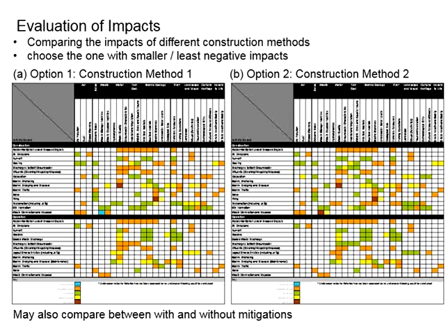You may also use this EIA matrix to compare the effectiveness of the mitigation measures proposed, where you can have one EIA matrix representing the conditions without mitigation measures, and create another EIA matrix representing the effects of the mitigation measures. And then compare the two EIA matrices side by side to evaluate the effectiveness of the mitigation measures.